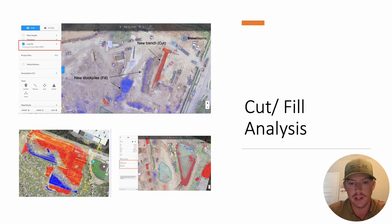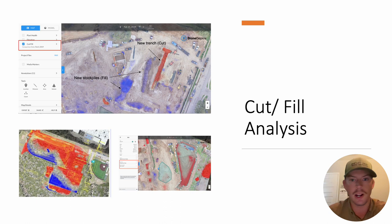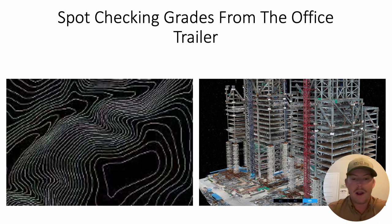Cut and fill analysis — you can see right here where my mouse is: a new trench cut and new stockpile fill, which is what we've been learning in class. It'll actually give you a cubic yardage moved so far. For my old project, we were able to see that we had moved over a million cubic yards of dirt from start to finish. It gives us a lot more management capability.